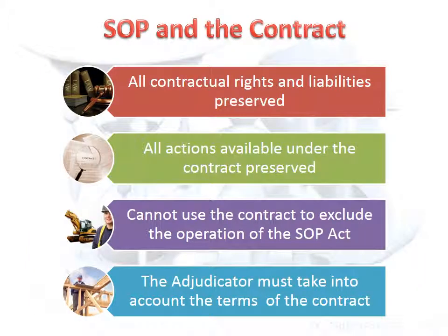The security of payment process does not change the operation of your rights and liabilities under the contract. Indeed, the adjudicator must take the terms of the contract into consideration when making any determination. The Act specifically preserves all rights, but if there is any provision in the contract that attempts to exclude or restrict the operation of the Act, then the term is rendered ineffective.